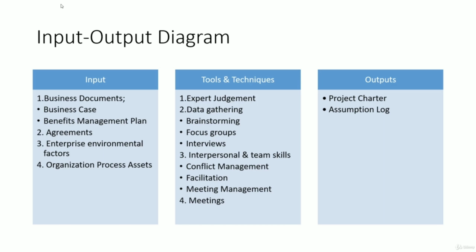Now let's say the website is ABC and you are sending data to XYZ. Your project, you as a project manager, are responsible for changes to this website. The assumption here would be that the team working on that third party system is going to make the necessary changes so that they can consume the data coming from your website.